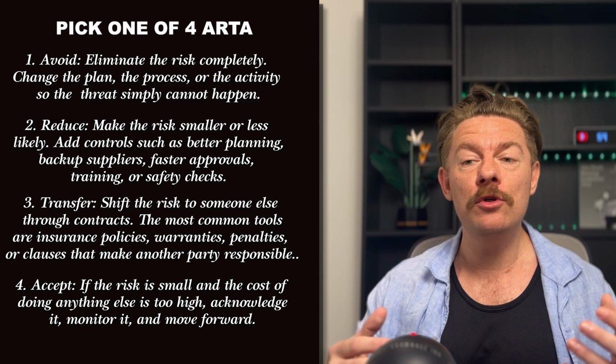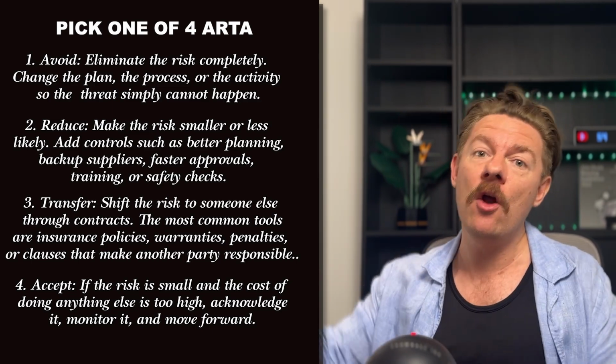What do you need to do to stop these risks from escalating right now? Always keep it specific and practical. Vague statements like monitor supplier risk won't suffice here. Actions should look like this. It should say something like source 2 alternative suppliers and confirm pricing of each, or resequence the program to avoid weather sensitive activities in January, like laying cement or bricklaying. Your action plan should be clear enough that someone else could pick it up tomorrow and know exactly what to do.